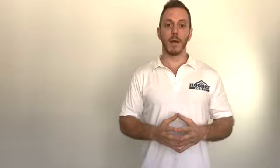When you're starting your property journey, I would allow 20 to 30% as a contingency, because realistically, you're going to have no idea what you're estimating. You can bring your trades in and get quotes and advice during your due diligence, and after that you can obviously bring that margin of error down, but I'd still probably leave at least 10% because, as I said, there's always going to be unknowns in a cosmetic project.